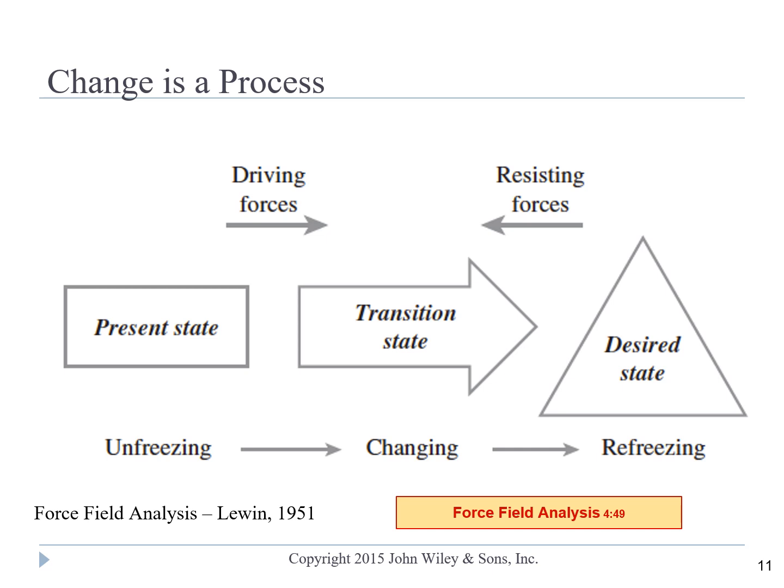Those are the forces that are actually supportive of this change, and they would like to see this change occur in the organization, versus looking also at the resisting forces. And those are the forces that are opposing the implementation of this change. And looking at both of those and then deciding what actions to take is what Lewin came up with as the force field analysis.